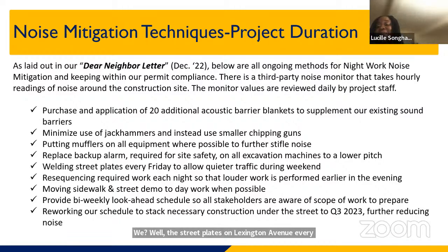Additionally, we weld the street plates on Lexington Avenue every Friday to allow for quieter traffic during the weekend. So sometimes when we're doing construction and people hear the boom, boom from the metal street plate, we weld those down so you don't hear as much of a reverberation coming back.